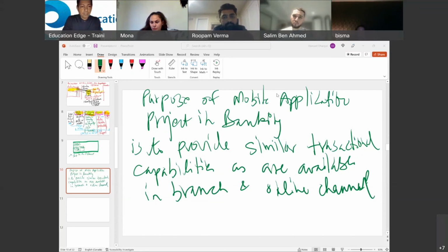My most recent project has been with RBC Bank, and I've been working with them since June 2019. The purpose of the project was to provide similar transactional capabilities as were available on the online channel. As this was an agile-based project, once I understood the business need and put the product backlog in order working with my product owner, we started doing iteration planning. During iteration planning, we prioritized the user stories and also developed acceptance and evaluation criteria for them. During daily standup, I became the point of contact and provided clarifications to the development team on any user stories. Sometimes I facilitated the sessions.